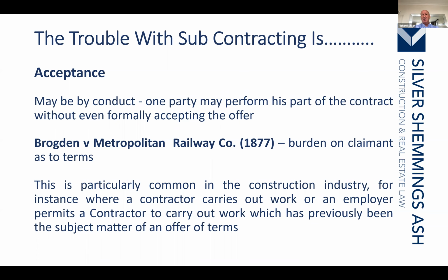And this whole scenario is often referred to as the battle of the forms. And it happens more than you would believe. And quite often, it can be of huge significance because quite clearly, the subcontractor's terms are going to be far more beneficial to the subcontractors. And quite often, they will have exclusion clauses and limitation clauses for delay and other matters.